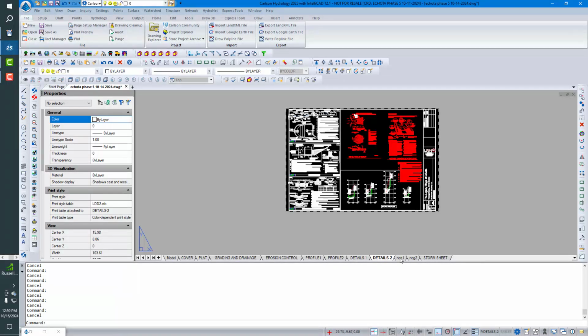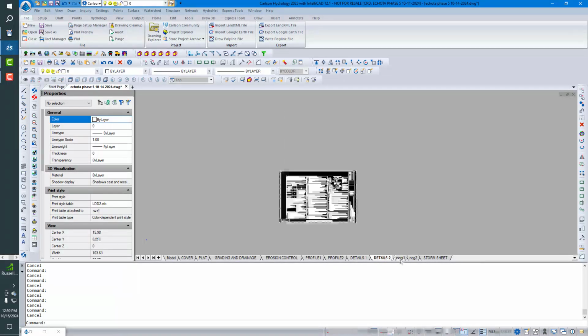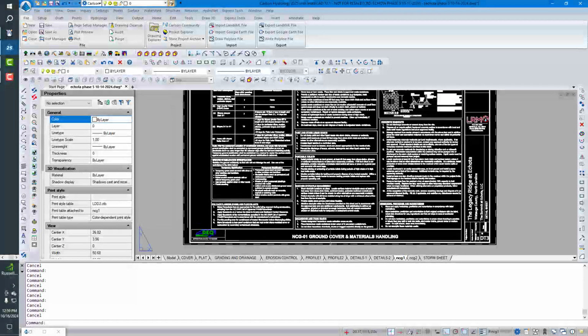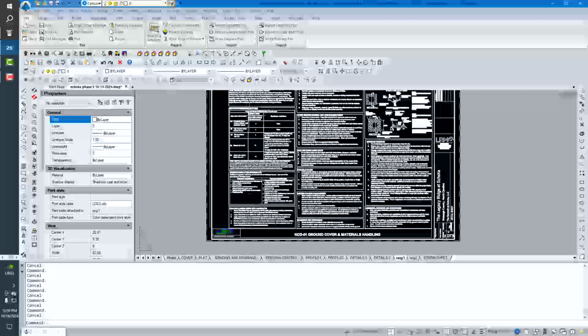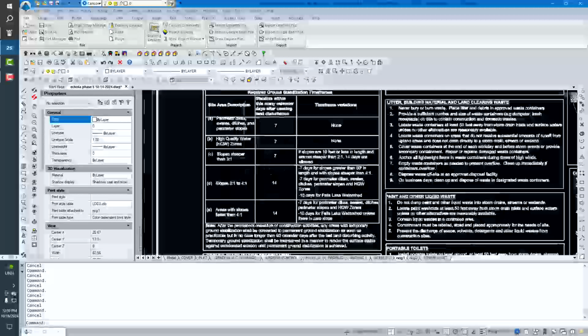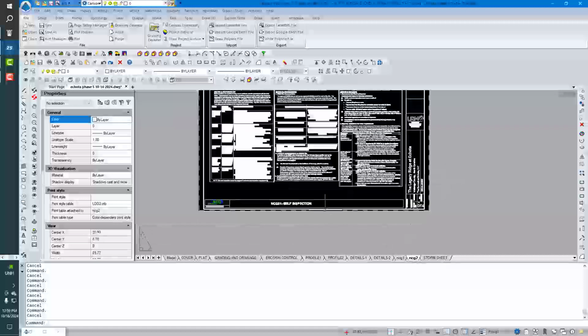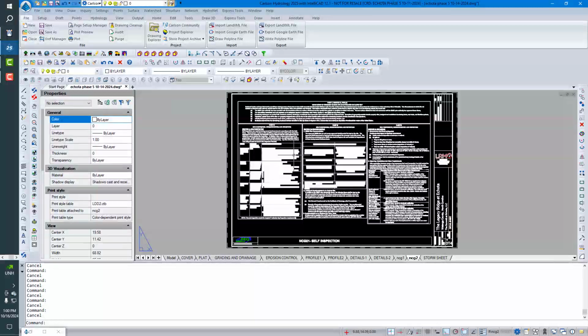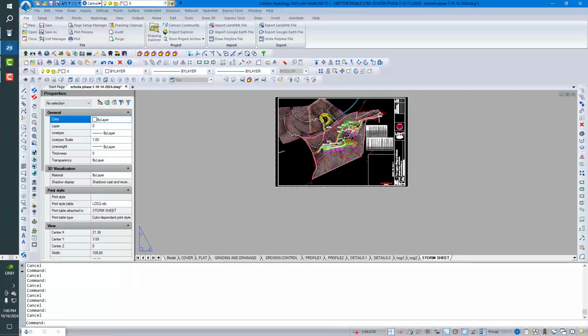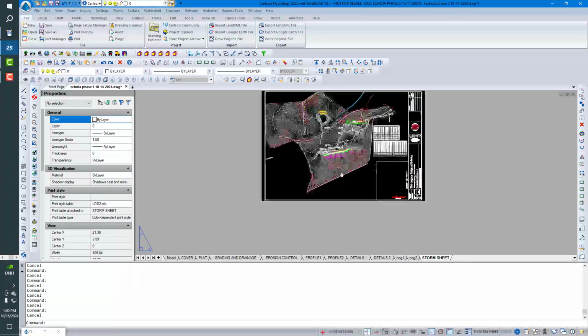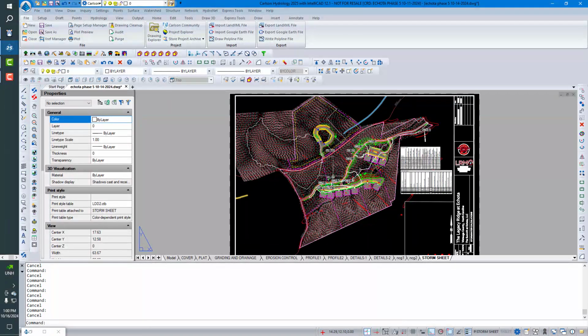These two sheets here, again, this is part of the state permit that we share with our SWPPP, NCG01. Instead of us coming up with our own custom planting and seeding schedules, you can get this from the state. Same thing on this sheet. This is the self-inspection form, and I downloaded this from the state. And then the last sheet typically is sort of a catch-all calculation, just in case these plans get separated from the calculation booklet that goes with it.